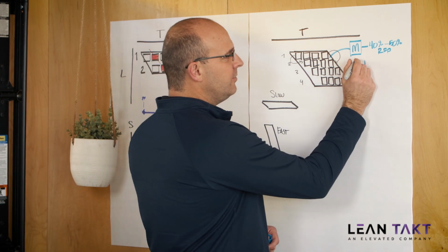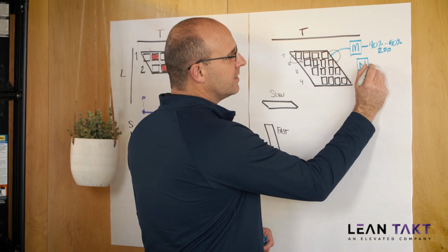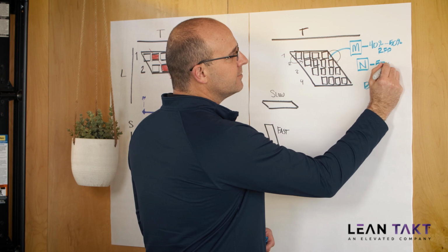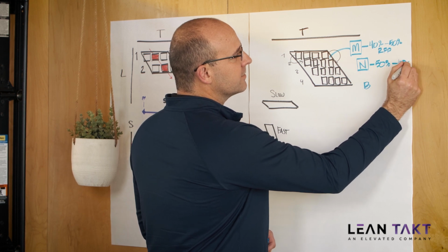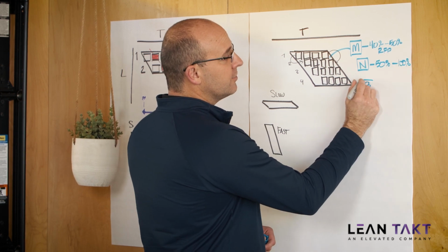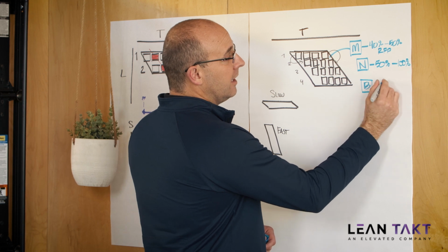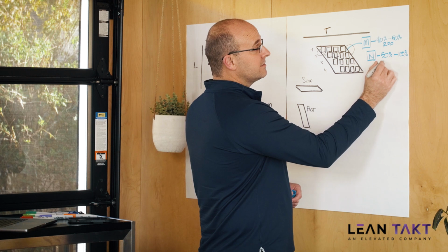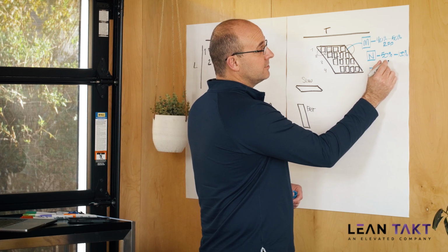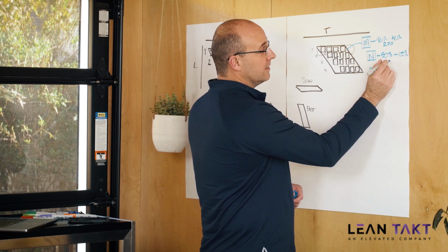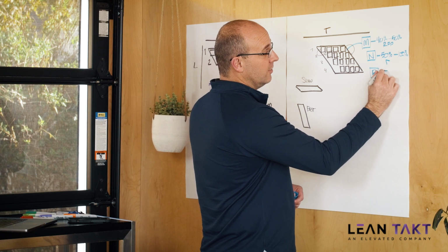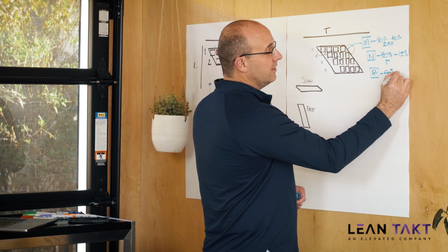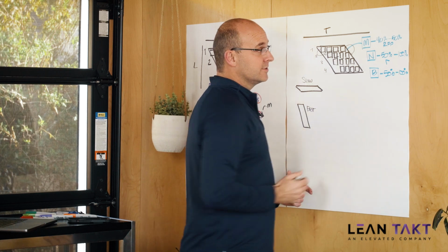Now, your norm, which is your production level schedule, will be between 50% and 100%, okay? So will your backup, okay? The only thing is that I want this percentage to be less than this one whenever you calculate it, okay? So this is what this is going to look like.